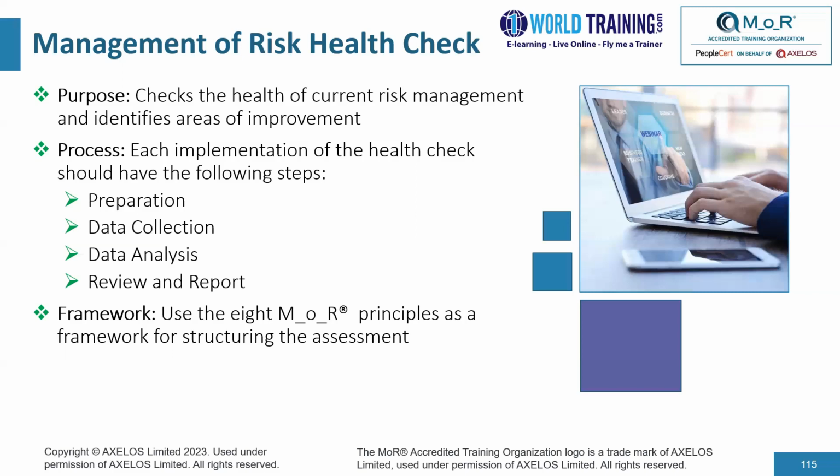Appendix C in the official MOR version 3 manual covers the management of risk health checks in greater detail. So we've got 4 steps that we employ when we carry out a health check. We prepare for the health check. In other words, what is it that we would like to check, what documents are required, and who are the people involved to sign off.